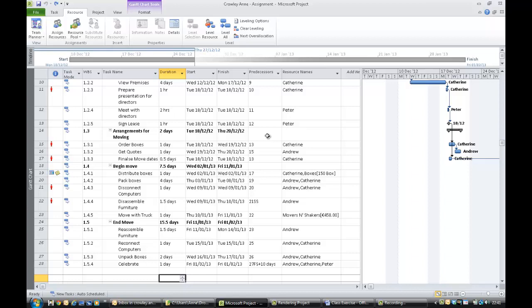But for the purpose of Microsoft Project, as I'm introducing it to you, you're going to take Microsoft Project at its best. You're not going to get involved in different leveling options. You're just going to level all and leave it at that to deal with the over allocation. So first of all, you save your project. So very important. And then you go and hit the level all button. Notice as you hover over it, it says level all. Leveling resolves resource conflicts or over allocation by delaying or splitting tasks based on the settings in the leveling options dialog box.